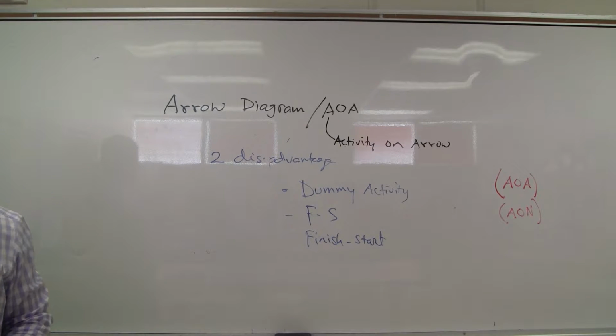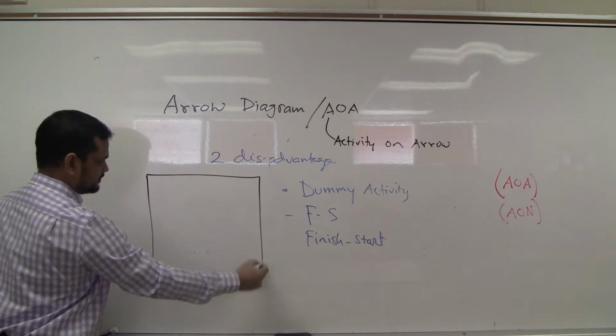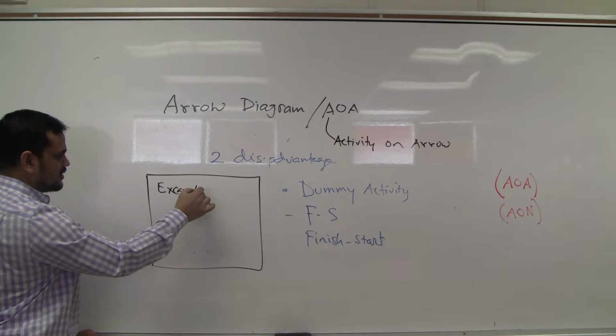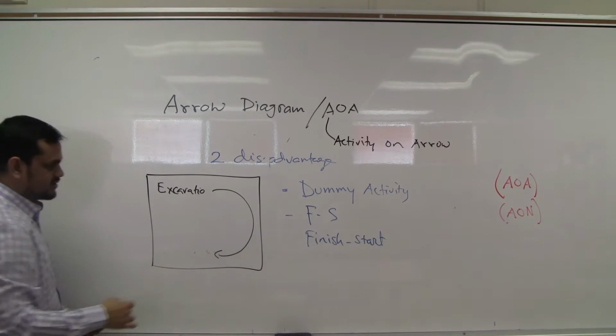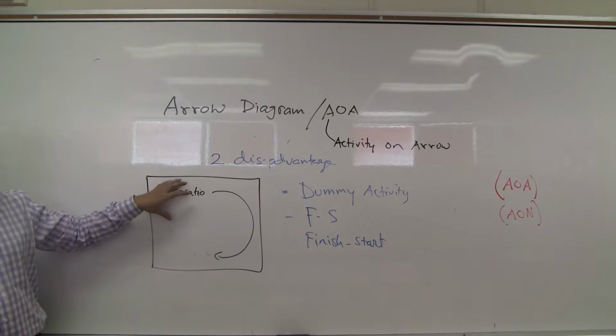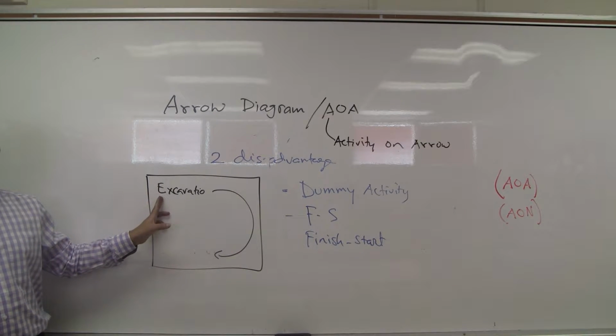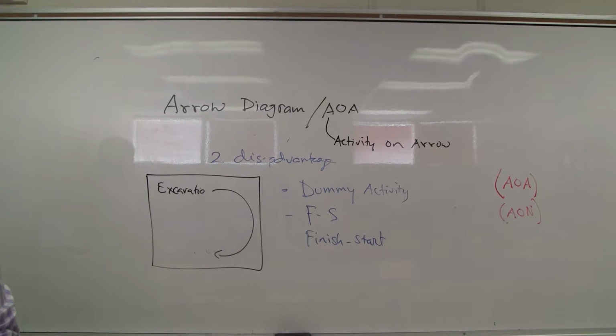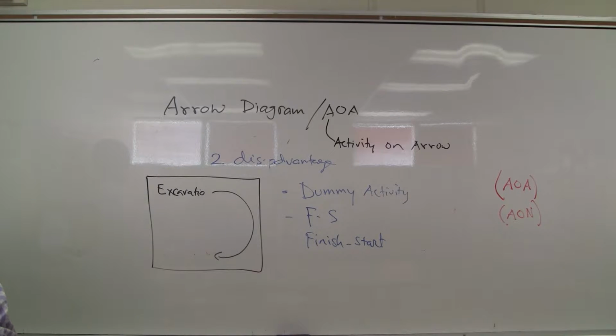Now, it is not always true in real life. If you think, okay, this is our project area. Here we are doing excavation. So it will continue like this, right? We will start excavation from here and continue this way. Once excavation is done, we can start making the formwork here. So after one activity started, after 2 days, 3 days, 4 days, we can start another activity at the same time, parallelly. We can, right? In fact, if you have any experience in real life, we do it.